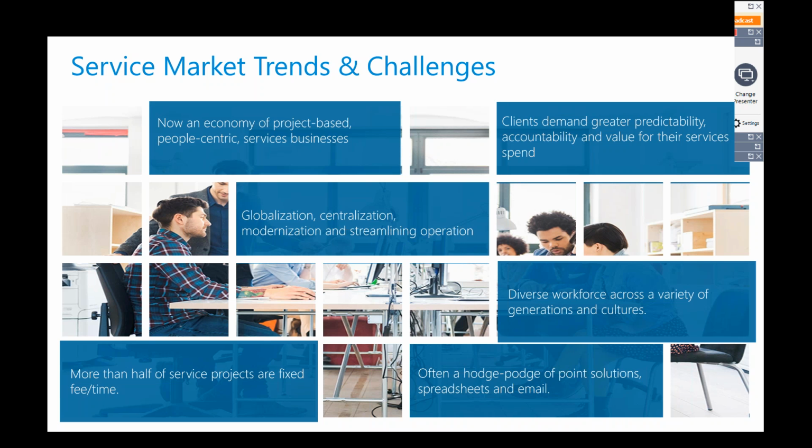Also, more than half of services projects today are now fixed fee in time, meaning we as service providers are taking on the risk, and if we don't manage these projects effectively, we can quickly go from a profitable engagement to a losing engagement in very short order.